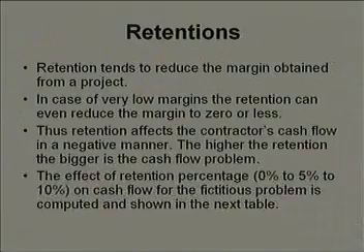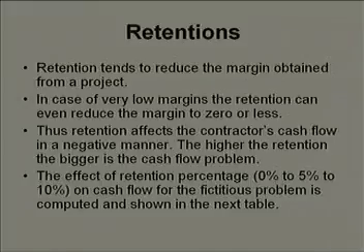So, you will find through your analysis that if you have got a project at very low margin and on top of it the contract has some retention clause, sometimes the effective margin may be even less than 0. The margin gets eroded. How? It gets compensated with the loss on interest, which you could have made had the money not been with the owners.